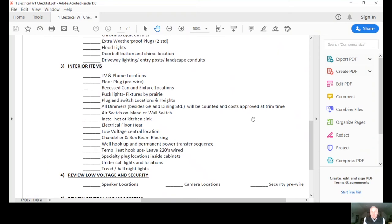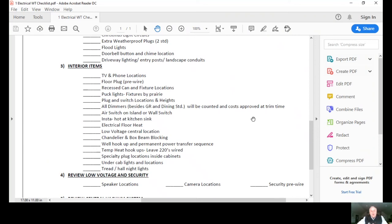Any chandelier or box beam blocking, we want to review that. If it's on rural property, the well hookup and permanent power on the transfer sequence. Temporary heat hookups, this is while we're drying your home out. We need to have those located.